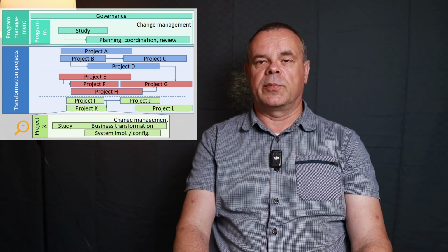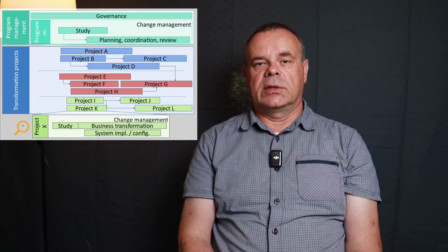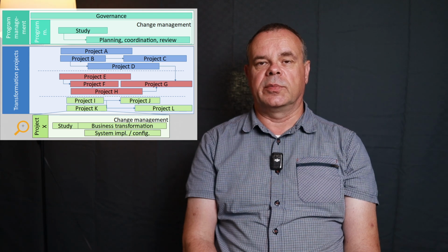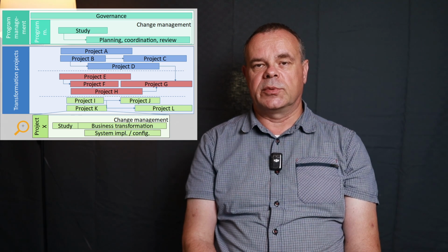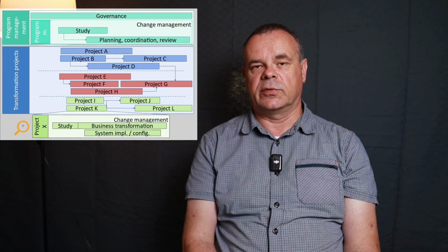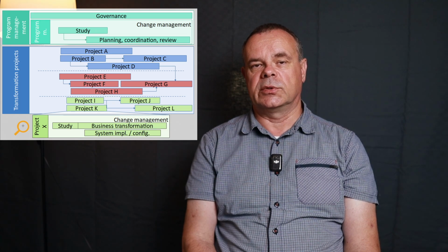We can identify project dependencies from the information flow map. They follow dependencies between systems affected or to be implemented. Beyond simple project sequences, we can find interdependencies between milestones of different projects, as affected systems may interact with each other at multiple points.